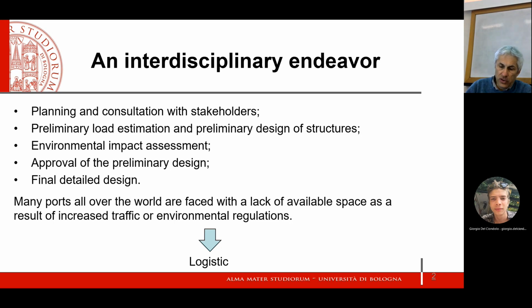It always happens that the first cost estimate is usually excessively optimistic. It is usually increased when we pass to the final phase of the design process. Also, the preliminary design allows us to make an environmental impact assessment, which is required when the infrastructures exceed predetermined sizes that are fixed by law.